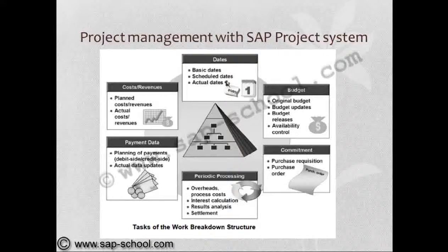The further elementary parts of SAP PS are dates, where we use the basic dates, schedule those dates, and confirm the actual dates; budgets, the original budget and whatever updates take place, and budget approvals, and all the time the availability control